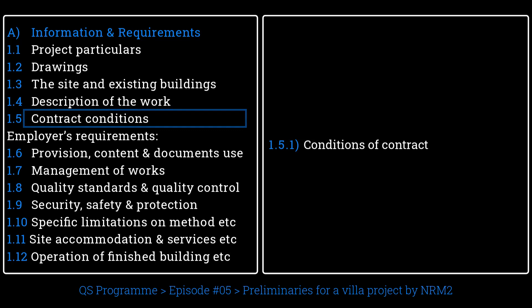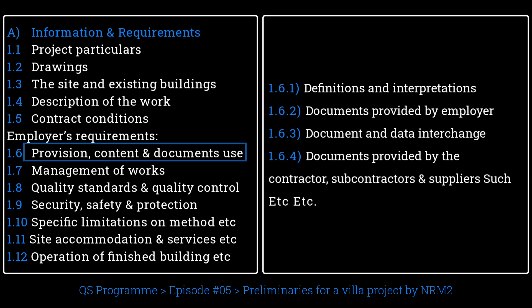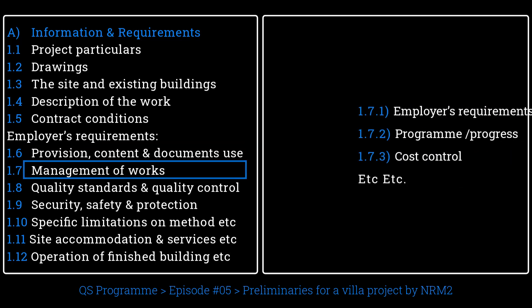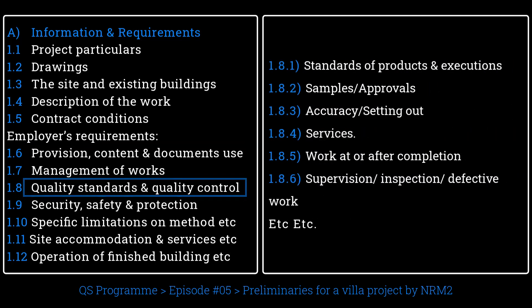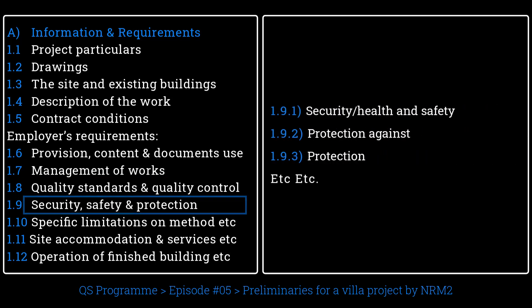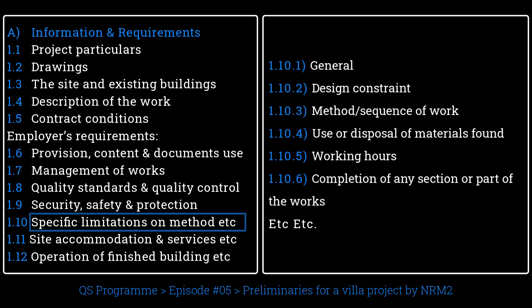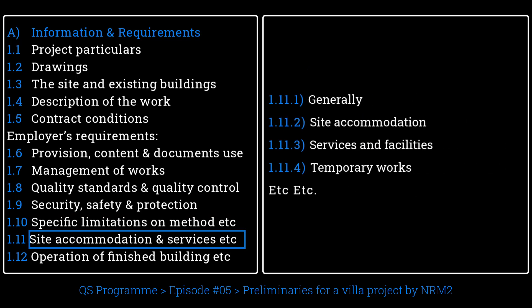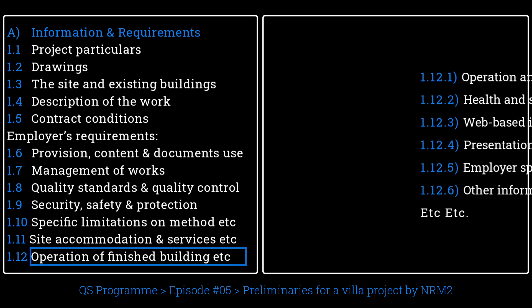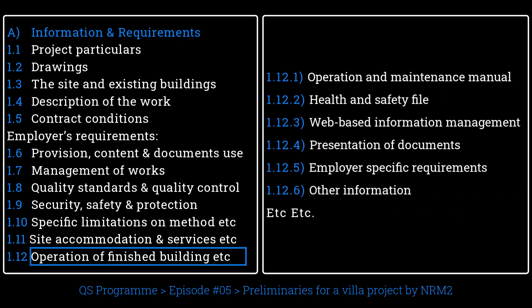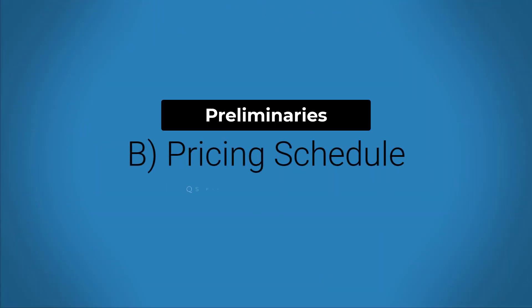The form of contract title needs to be defined, such as JCT, NEC, and GCT, etc. Employer's requirements cover provision, content and use of documents, management of work, quality standards and quality control, security, safety and protection, and specific limitations on method, sequence, and timing. Site accommodation, services, facilities, and temporary works are also included, as well as operation, maintenance, and the finished building.